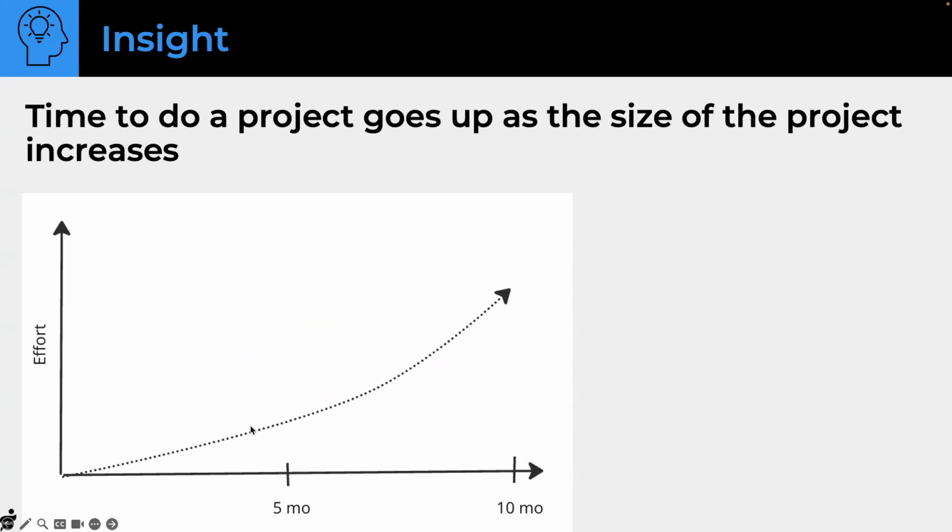In other words, we might be able to build something in 5 months, but as you keep adding to it, as it gets bigger and bigger and bigger, it takes more time to build. It's just a way of life. Now, you can improve this with good architecture and good design patterns. I mean, if you're really good, maybe you can keep this linear. Most people aren't that good. Automated testing, stuff like that. So the nature of our work typically goes up faster as time goes. That's been my experience. If it's not your experience, then you wouldn't have gotten this value.